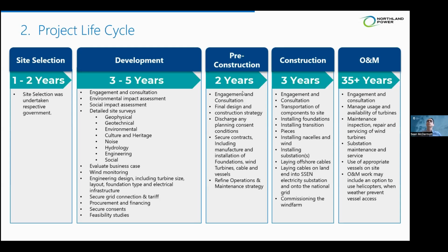That's on the longer end for reasons relating to construction schedules in Taiwan and specific procurement and permitting regulations. But nonetheless, the process of building an offshore wind farm, taking it from concept through to permitting, through to development, through to offtake, through to financing, through procurement, through to engineering, to construction and to commissioning, is a long, expensive process.